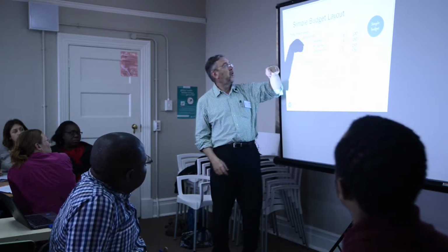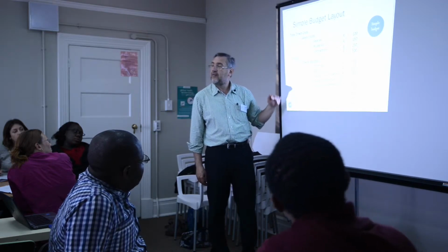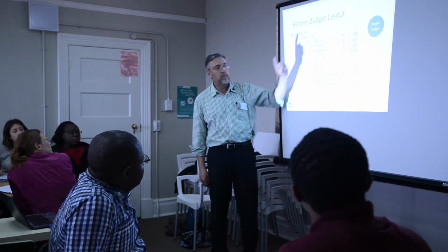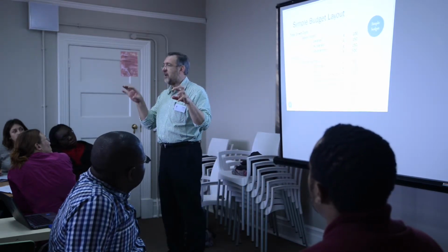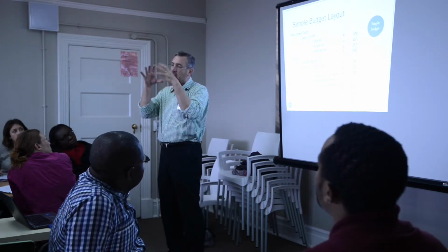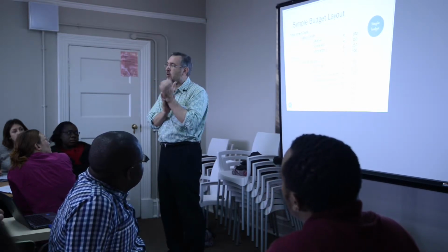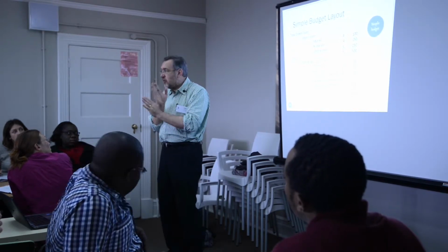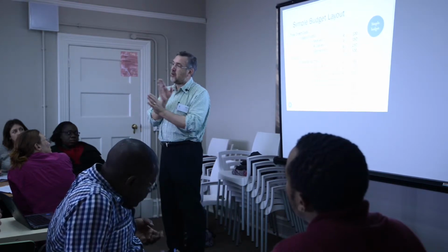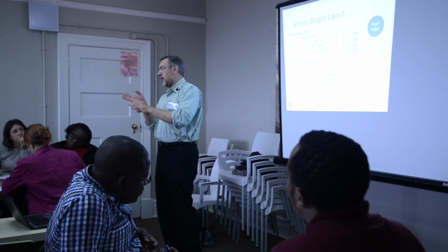Now, the NRF is sort of at the level of, so long as these levels, the subtotals, don't change, they're fairly happy with it. For example, in their bursaries, you would apply for 2 master's and a PhD bursary. When they give it to you, they would give you a lump sum, and you could end up, if you could afford it out of it, giving 2 PhDs and 1 master's, for example. They do give you a bit of flexibility. But not all funders do that. So too much detail gets you into trouble. Too little detail won't get the grant. So again, another fine line to negotiate.